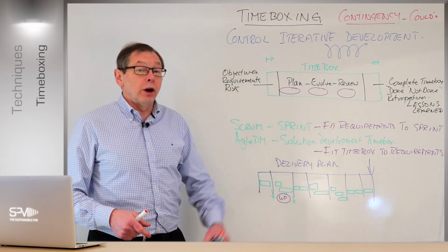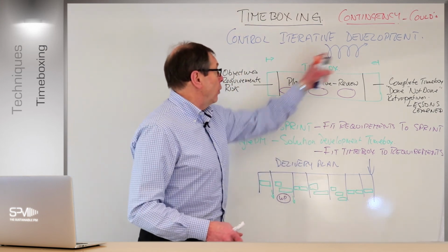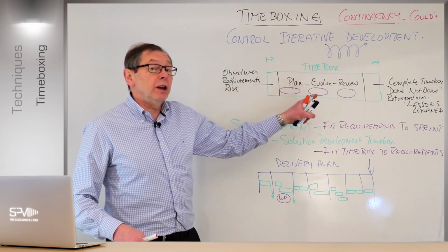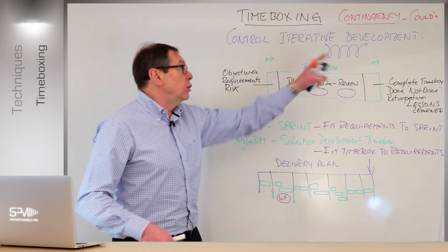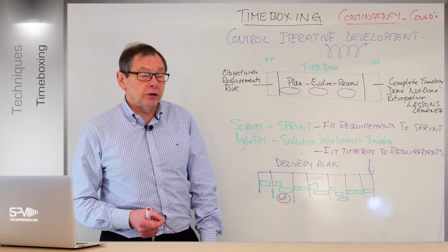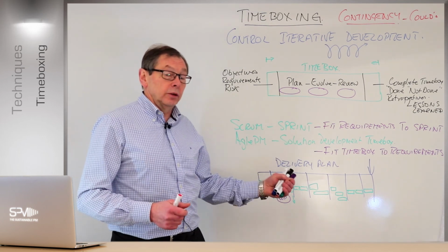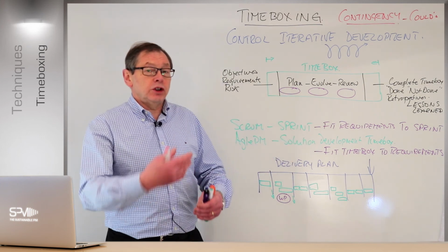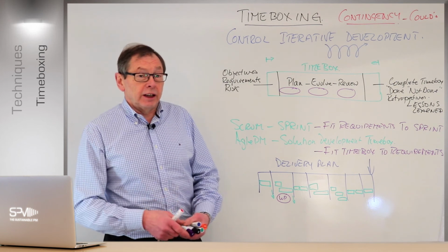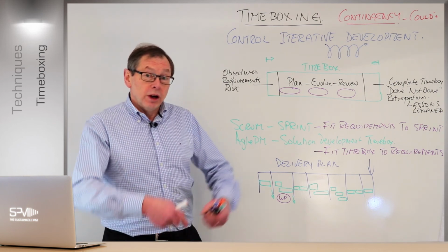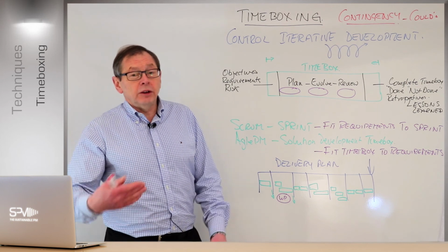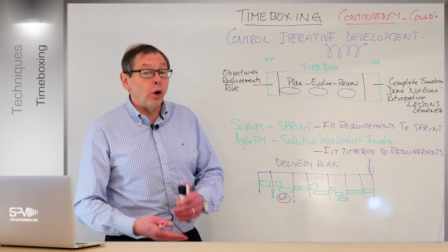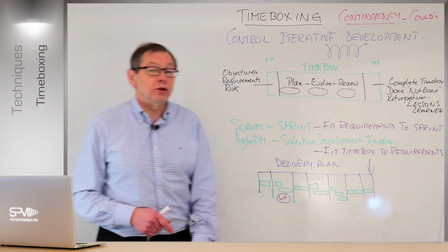or even out of the whole project to make sure we end up on time, and therefore any extra time we may need for a particular requirement or more within the same time box, we can get that back by removing requirements that we don't need for that particular solution for that time box or that increment, right? So that's the other useful area here, and that's why that diagram, when we shift around using scope as an understanding, because now we can look at it from a priority point of view from the project, and also gives us an indication of what we can use as contingency within the time box and the increment and even the whole project to ensure that we deliver the solution on time.